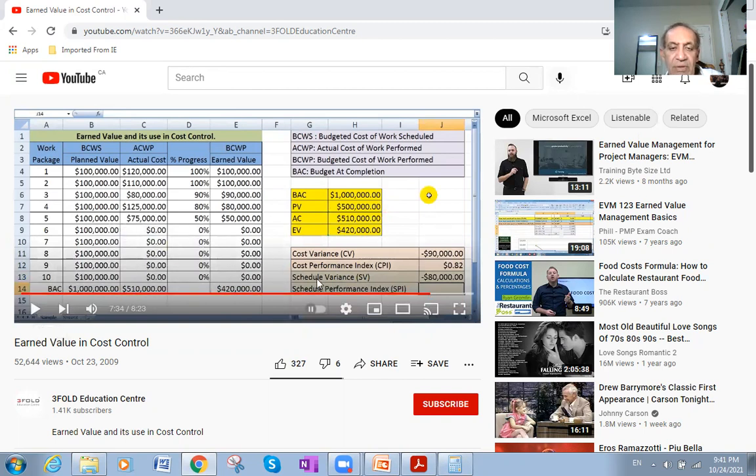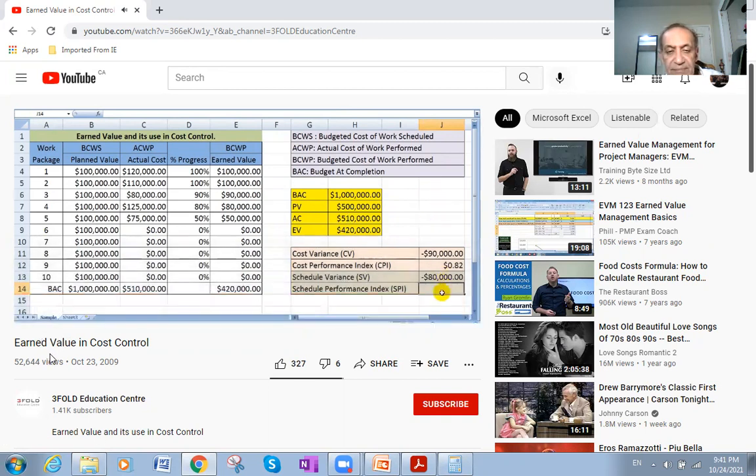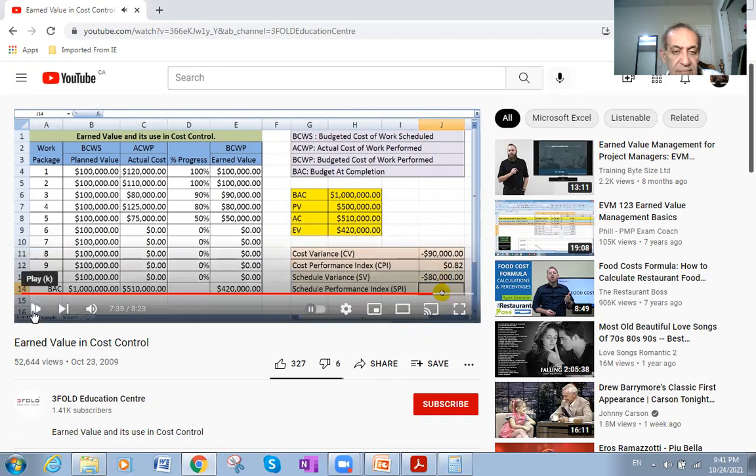Schedule means the norms. So you will say 420 minus 500, or $80,000 behind schedule.